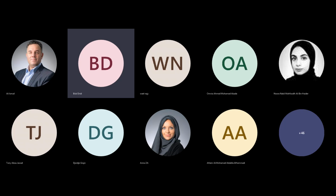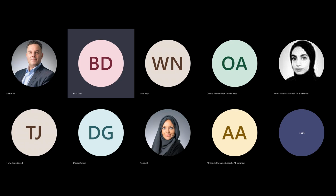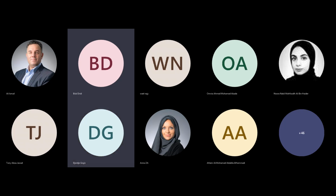Every time we finish a stage or create a part, we have to discuss between each other and find out what the problem is. Is it clear? Is it okay? Is it simple? It's not complicated, right? So let's jump to the next step. We go with creating a folder structure, then adding the project team members, then the permissions, then creating a naming convention template with an automation system inside your platform, and so on.